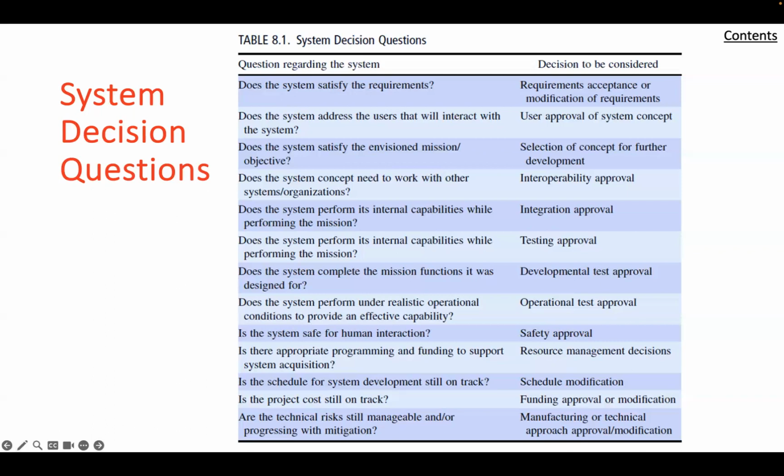The common example is the requirement development in early phases set the resourcing for design and testing in the future phases. If the requirements are found to be developed incorrectly, that would cause an adverse impact to the future resource planning and may cause project delays while revising the requirements.